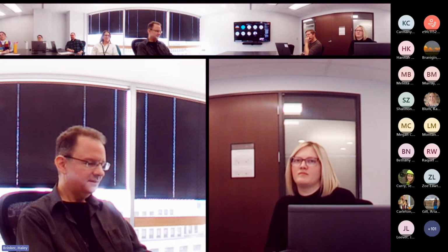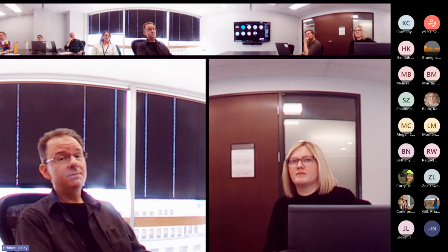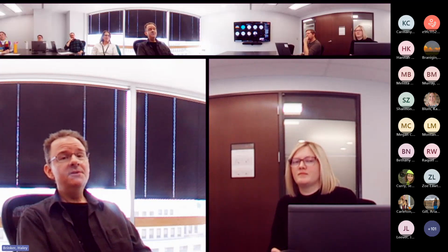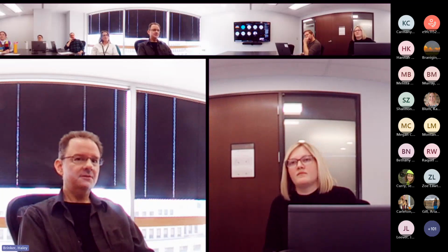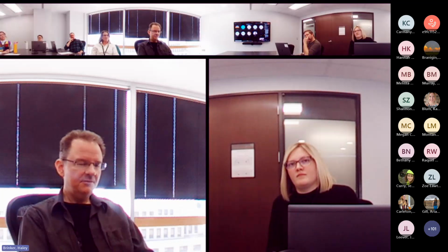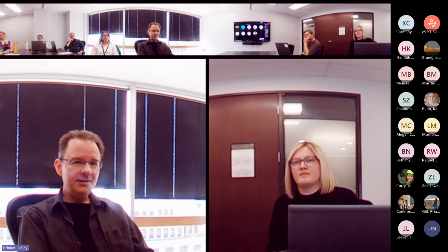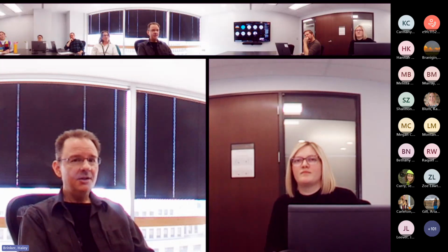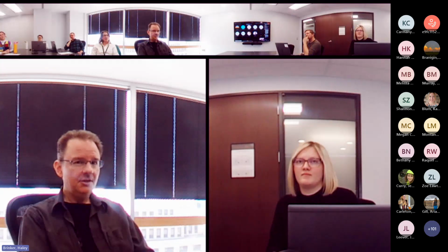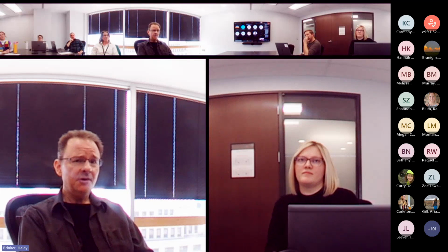And that includes things that are somewhat outside of our control and difficult to foresee, like requests for expedited reviews, for instance. In the first 3 months of this year, we've had, I don't know the specific number, but it's more than I think we can remember having had in that same time period. Each one of those, expediting one project, effectively pushes all other projects farther down in the queue. The greater the number of expedited review requests, the farther back everything else gets pushed.